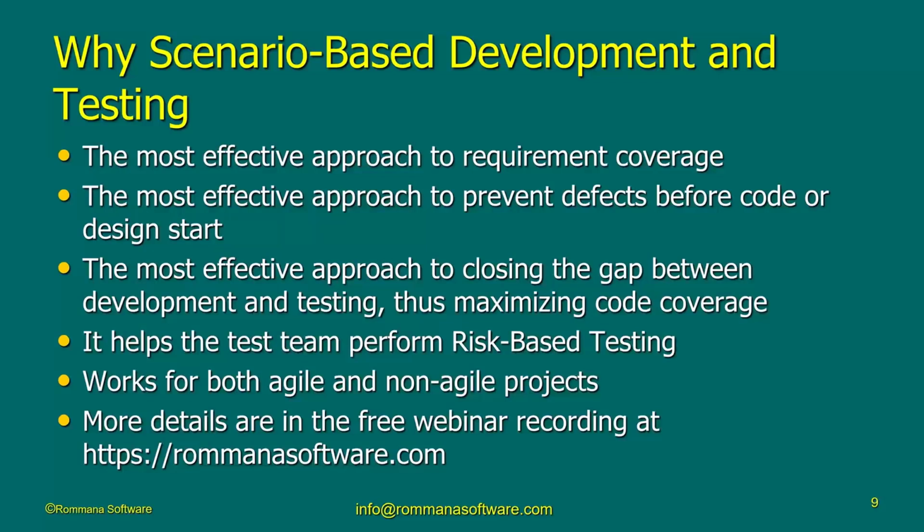Okay, but again, I'm not going to take the time here to explain to you why scenario-based development and testing are critical to any project. Most importantly, it allows you to do risk-based testing, which no other approach allows you to do. As I said earlier, we never have time to test everything we have to test. So scenario-based development and testing will allow you to select the most critical scenarios and create test cases for that. Okay. And most importantly, the risk-based testing is done on the scenario level.